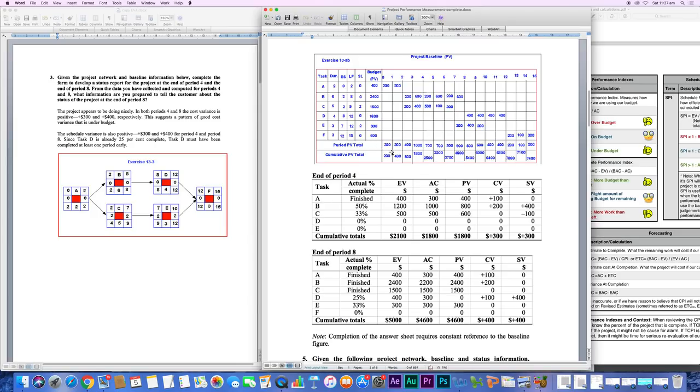And then we have accumulated one. 200 plus 200 is 400. 400 plus 400 is 800. 800 plus 1000 is 1800. And when we get to the end, when we add all up, we get what? This final one is budget at completion, because we added plan value for each activity, either over time or by the total plan value of each activity.